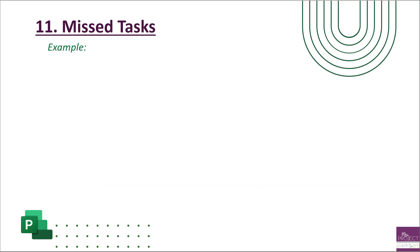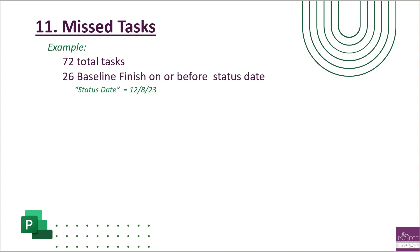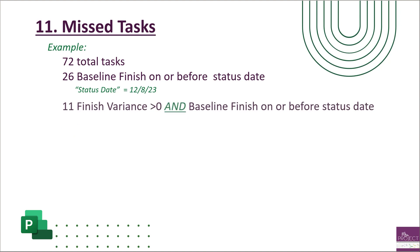A simple way to calculate this: we have 72 total tasks in our IMS. When we filter on the baseline finish, we're looking for a status date that is on or before December 8th, and we found 26 tasks fall into that category. How much of those 26 also have a finish variance greater than zero? We have 11 tasks that have a finish variance greater than zero and a baseline finish on or before our status date of December 8th. So we calculate that by saying 11 divided by 26 is 0.42 - that's 42%. That means we've missed almost half of our original dates. We're falling behind.